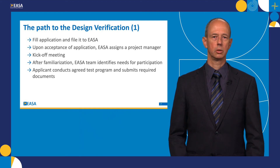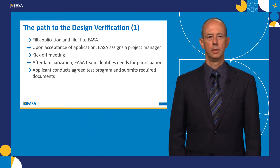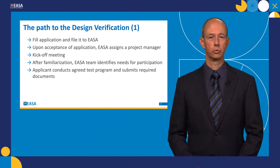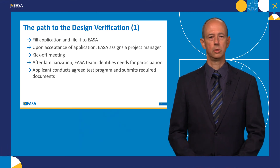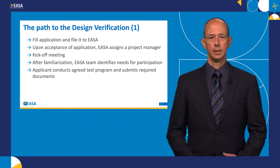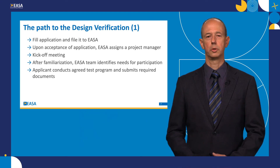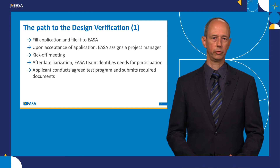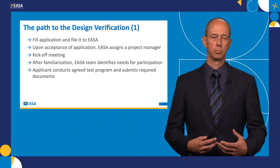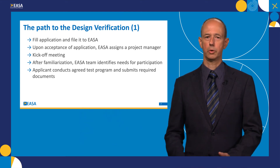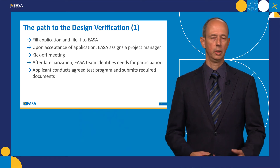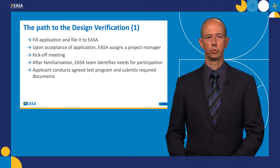The project manager will arrange an applicant's meeting with you to kick off the project. This will lead to familiarization with your project, your con-ops, the SAIL level, and your proposed means of compliance — which might raise questions from our side and may require agreeing on changes or complementary information. Based on this familiarization, we will also determine our engagement and participation in tests you are going to perform or other activities which may require witnessing from our side. Most of the activities will be conducted by you. You will carry out tests along a test program agreed upon beforehand, and eventually you will submit the required documentation such as substantiation reports, analysis reports, procedures, and manuals as agreed.